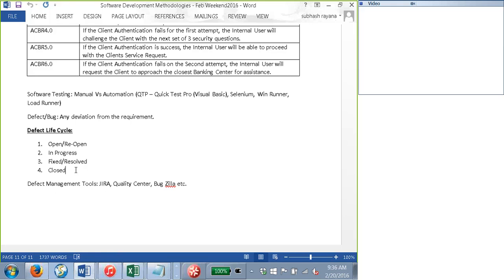Also, let us say there are 2 issues reported in the same defect, and one of them is resolved but one has failed, so he's still going to reopen it, right? So again, we are tracking the same defect, 50% is fixed, but it's reopened. It becomes very difficult to track and manage these defects. That's the reason, wherever I worked, I've strictly enforced that the testing team reports each defect separately, rather than clubbing them all up.